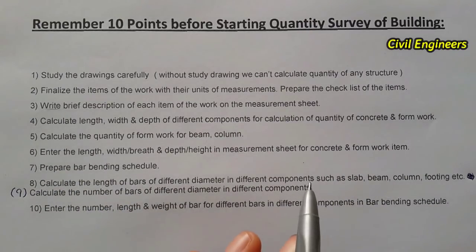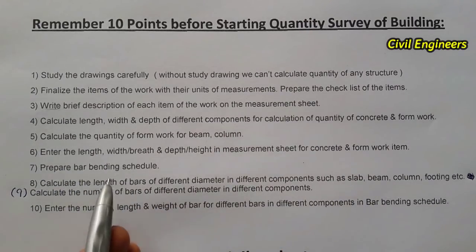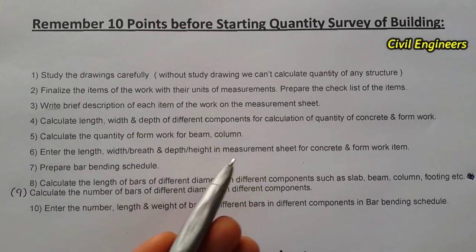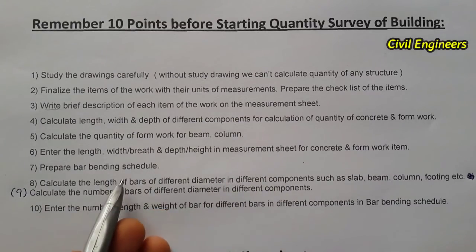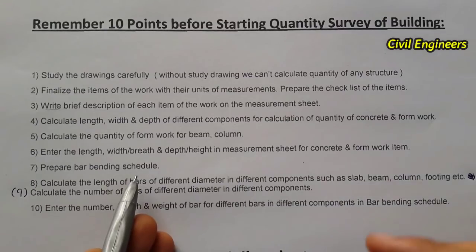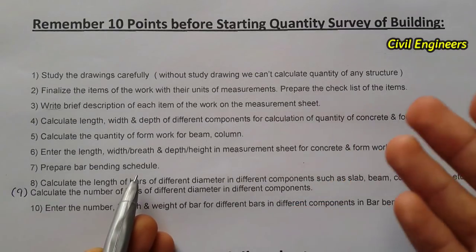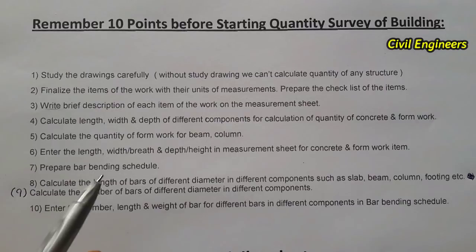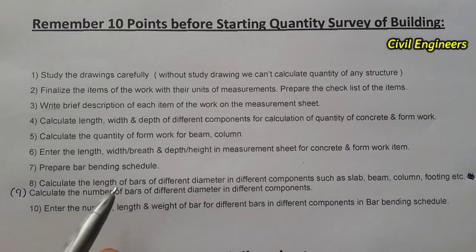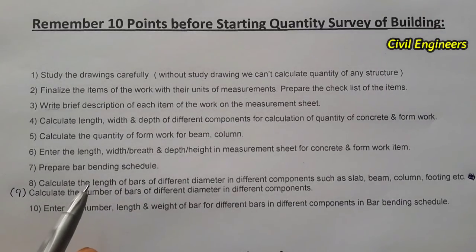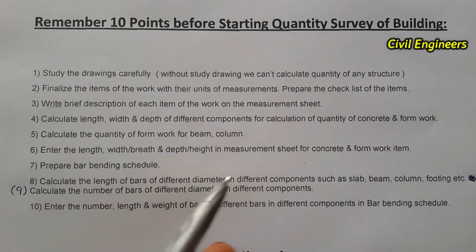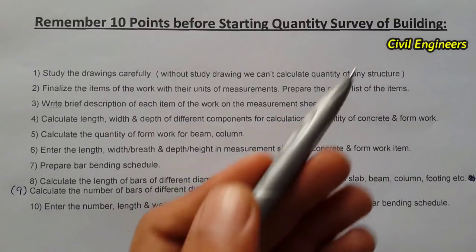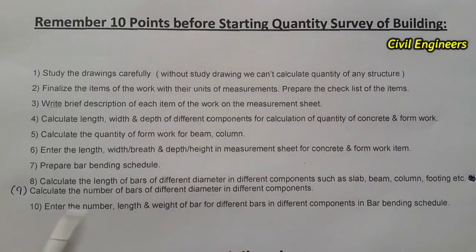The seventh point is to prepare a bar bending schedule. Bar bending schedule is very important because we have different types of steel, different diameters of steel, and different bend-up shapes. Without the bar bending schedule, we are not able to find the accurate quantity of any building structure.